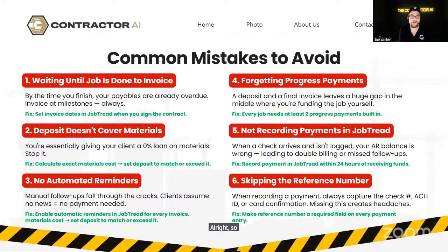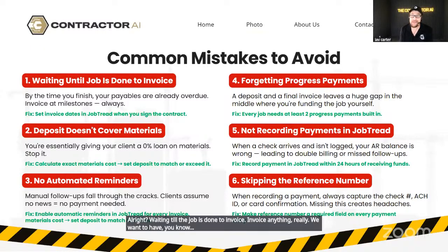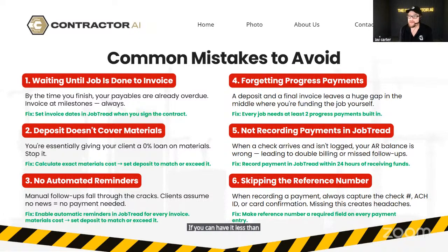So some of the common mistakes that we want to avoid: waiting until the job is done to invoice anything, really. We want to have that be less than 5%, if you can. And I'm going to explain in the next section why exactly that is.